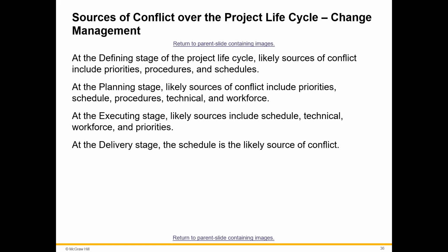Okay, and then when they saw that the schedule was not fair, they made that into an issue. And when they realized that the further we delay the project, the less bonus we get, it turns out that at the end of the day, we may not even get any bonuses. So all of a sudden, things that you had in the back of your head that you never talked about came to the forefront. Okay, so the question now is, instead of ignoring it, instead of putting it aside, let's talk about it in the beginning so that issues would not build up.